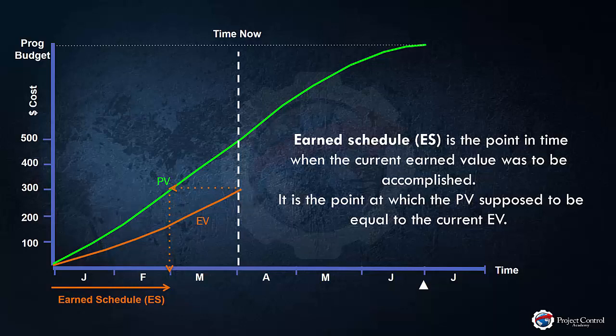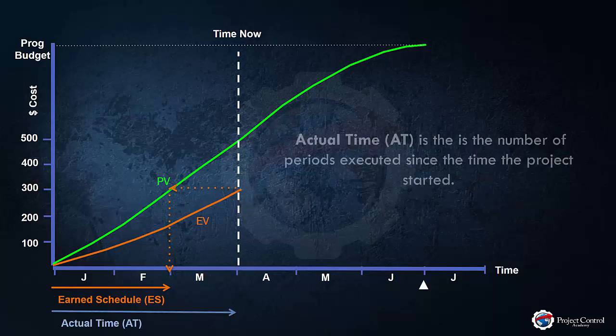Earned schedule is the point in time when the current earned value was to be accomplished — the point at which the project plan value is supposed to equal the current earned value. Another term you need to know is actual time: the number of periods executed since the project started, basically where we are now. In our sample project, we are at the end of March, so we are three months into the project. These periods don't need to be months; they can be weeks or bi-weekly. In our example, periods are months, so our actual time is three months.